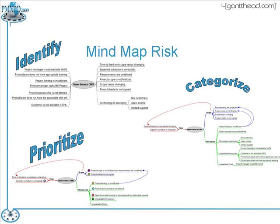After identifying all the risks, you go through a categorization phase. Here you see some risks are categorized under red, blue, and green colors — in this case around scope, time, and resources. Then finally you go into prioritization, where you take that same mind map and assign priority to those risks using numeric icons against the different nodes. This is one example of the NGT risk management and risk identification technique.